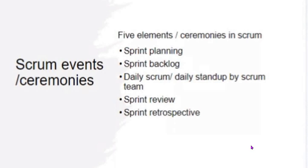Then it moves to the Sprint Backlog, where the team deliberates. During the Daily Scrum, the Scrum Team comes together and discusses the Product Backlog. It's like when there's a syllabus for a course — it is divided into semesters. Similarly, the backlog is divided into Sprints to make it sizable and achievable. Each Sprint could take 10 working days, two weeks, or sometimes a month.